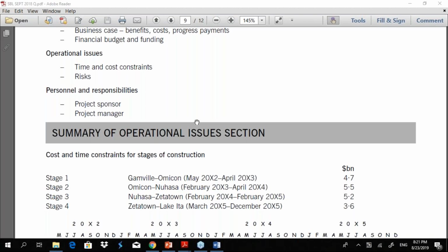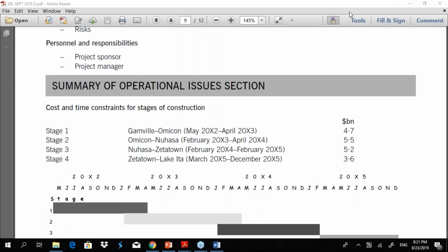Also, in the stages of construction, you have to bring in more detail, like I said, in terms of limitations and anything that you can't avoid, unavoidable situations, the kind of support and approval needed from the government to carry on with the project. You will need approvals from local authorities and things like that. So those kinds of details, what you expect from the government during a particular period of time.